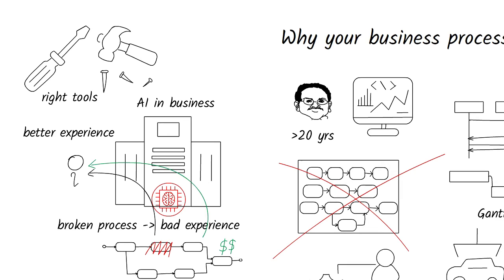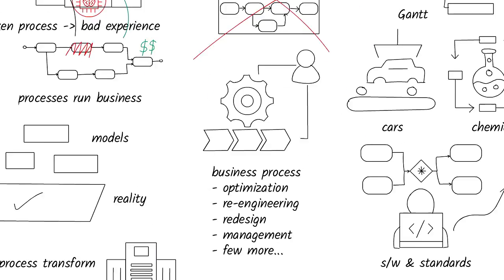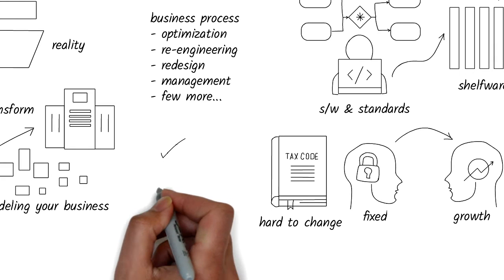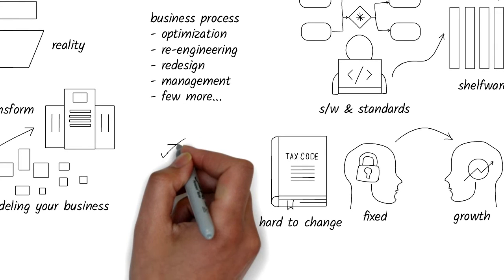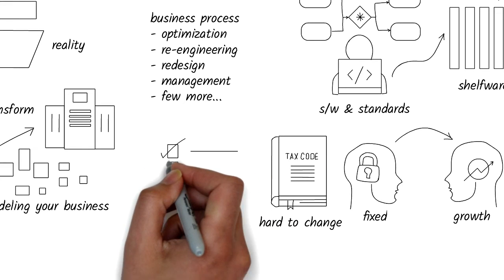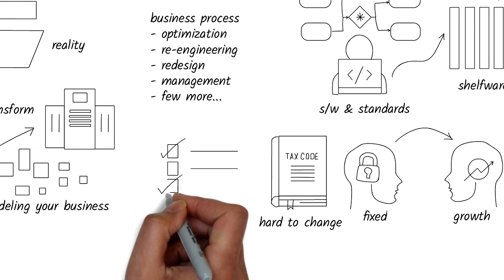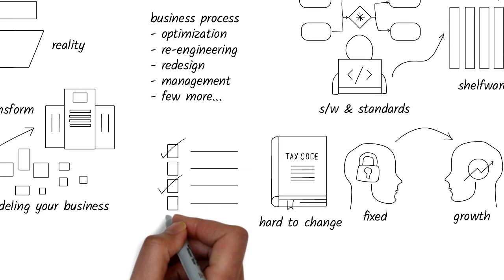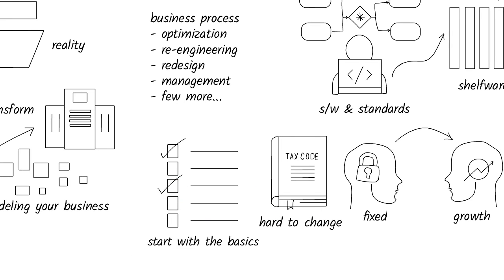So how do you fix this problem? Here's the best way to get started: list out all the work that must happen to get the job done. Also include which role does the work and what's required for them to do it. If some work is complicated, then you can simply hide that detail for now and drill down to it later if you wanted to.